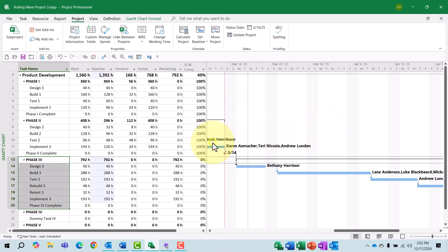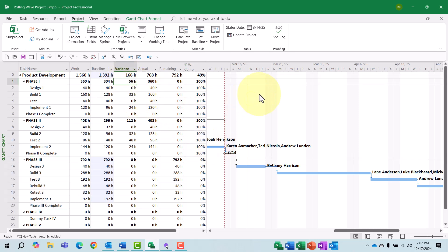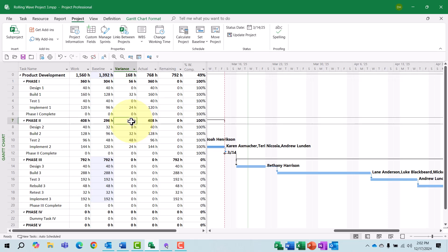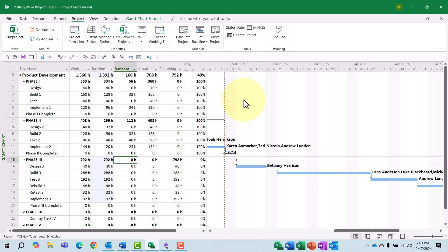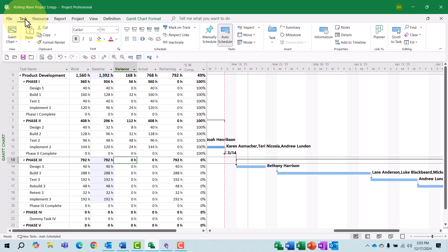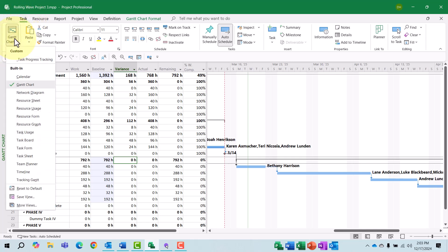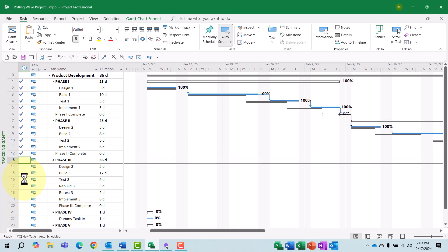When I click the Yes button, please notice the following: I have not lost the 56 hours of historical variance on Phase 1, and I have not lost the 112 hours of historical variance on Phase 2, but all of the variance on Phase 3 has now disappeared because all of these tasks have now been baselined. There's a little more I want to show you. If I click the Task tab to go back to the Task Ribbon and click the Gantt Chart Pick List button, I'd like to take a look at the Tracking Gantt view for this project to see how we are doing on the schedule.